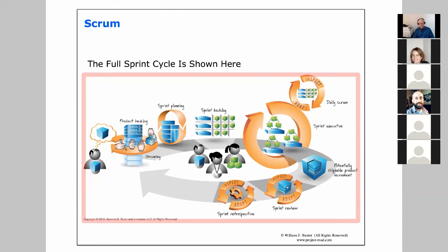And right after that, we'll have a sprint retrospective where the core team will get together and talk about, first, how did that sprint review go? And second, how did this whole sprint cycle go? And is there anything about the way we're working that we should change? What changes could we make that would make us an even more effective team going forward? So we're inspecting and adapting what we're building and the way we're working.